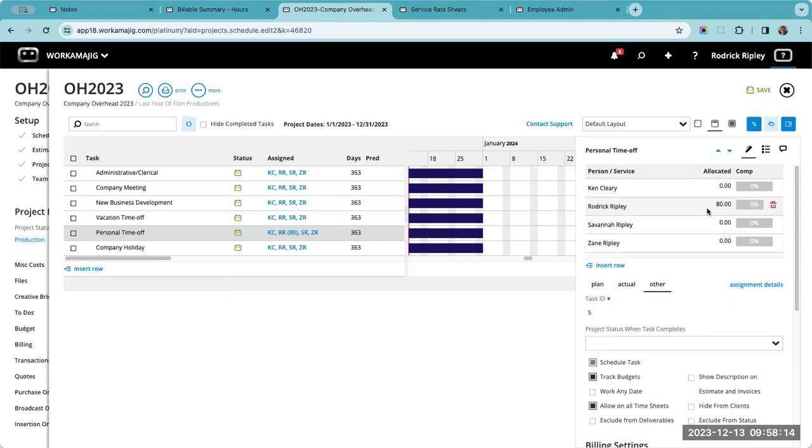And so if we need to keep all of that separate, I have some clients who go to another level above this, and they create an overhead project per employee. That way only that employee is assigned to that project. They're the only ones seeing the allocations and that information, because at a project level you can have more security over who can access that project and see information on it.